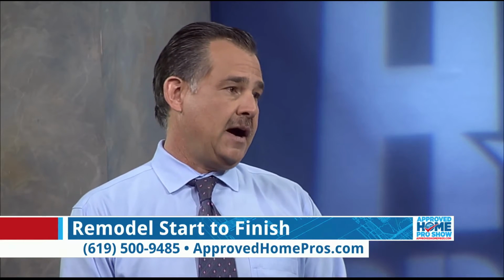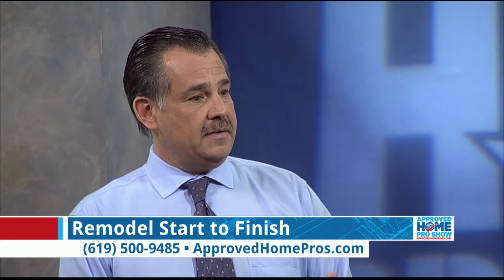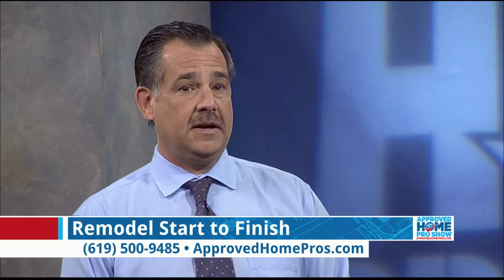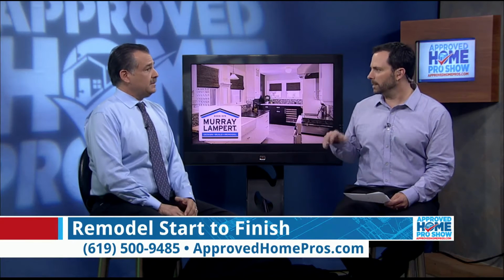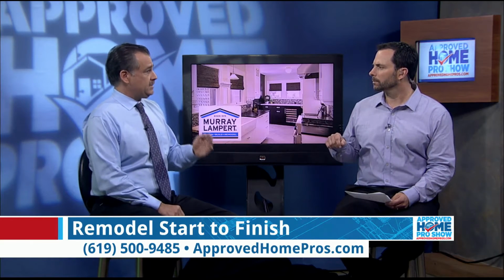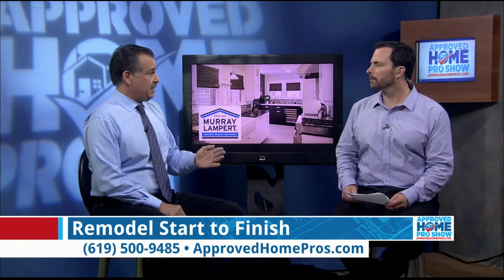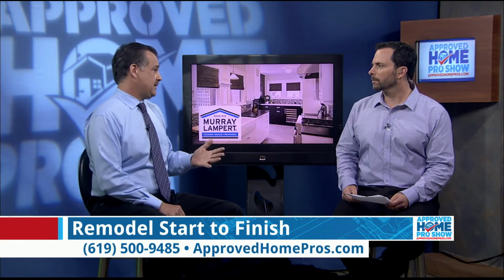But back to the allowances. An allowance is a provision for finishes, such as tile or granite. And if the finishes aren't specifically called out that you want in your contract, there should be an allowance. And you should know that that allowance is going to cover what your taste is. So don't trust the contractor to have put the right amount of allowance in the contract. There's an agreement, but it's in the contract and it's a specific dollar amount. So you might want to go shopping and see what that's going to buy and make sure it's up to par with what your taste is.